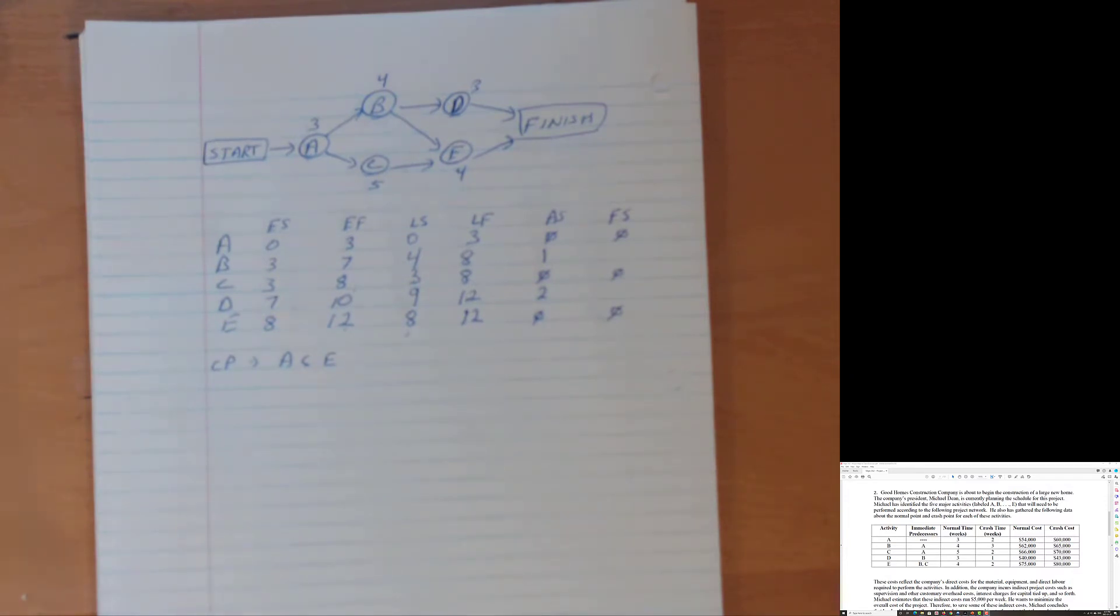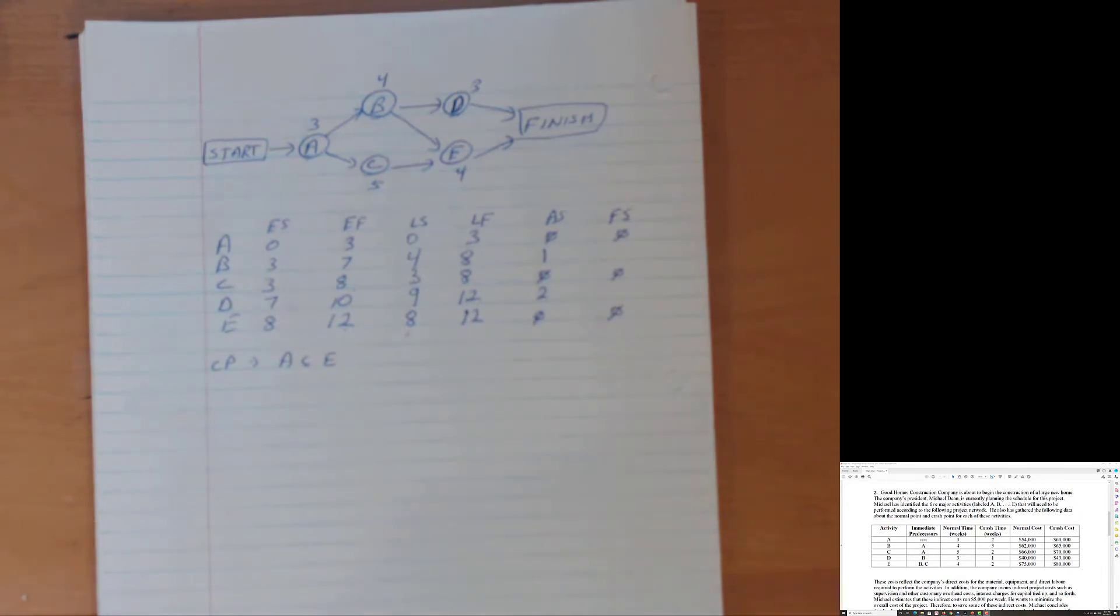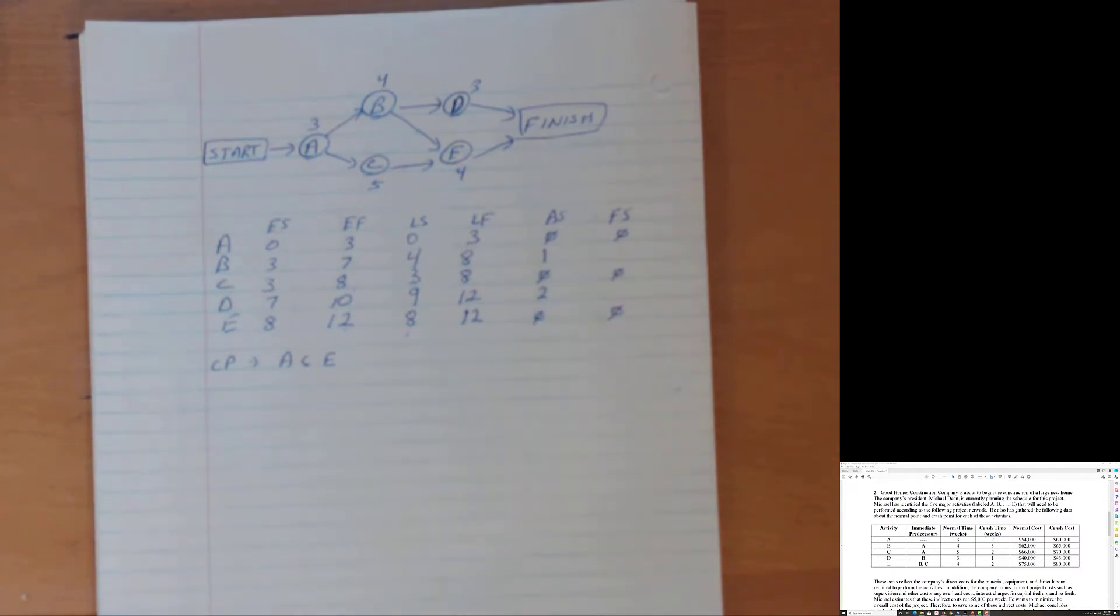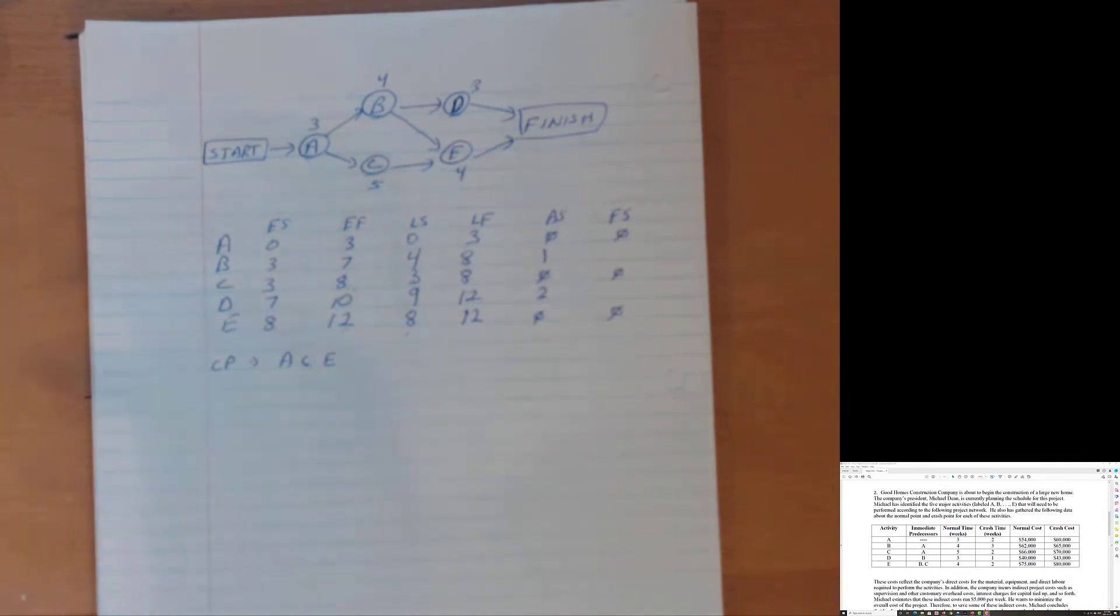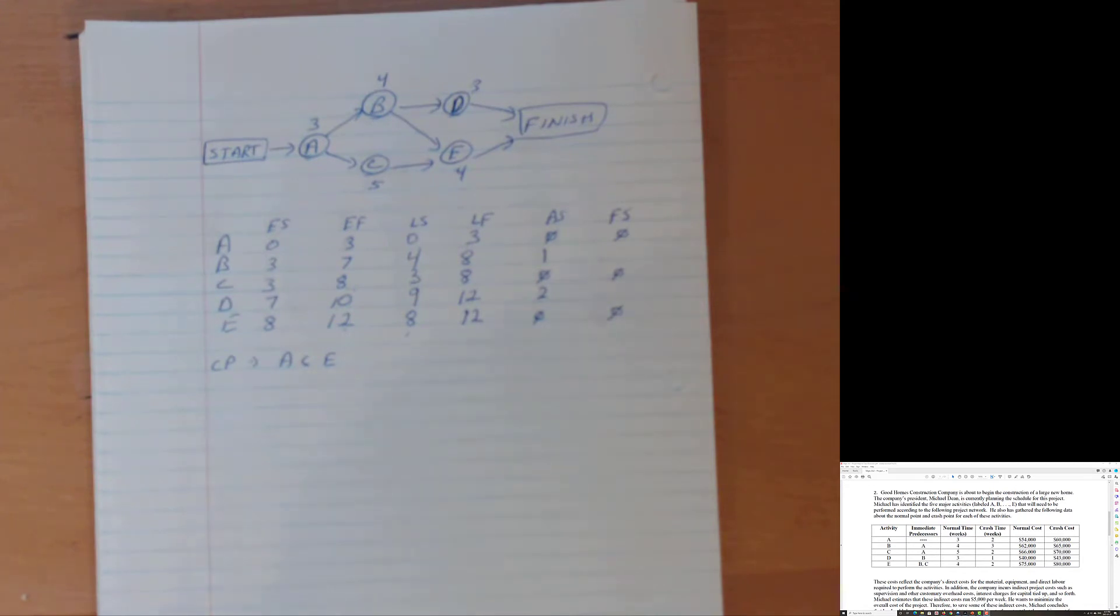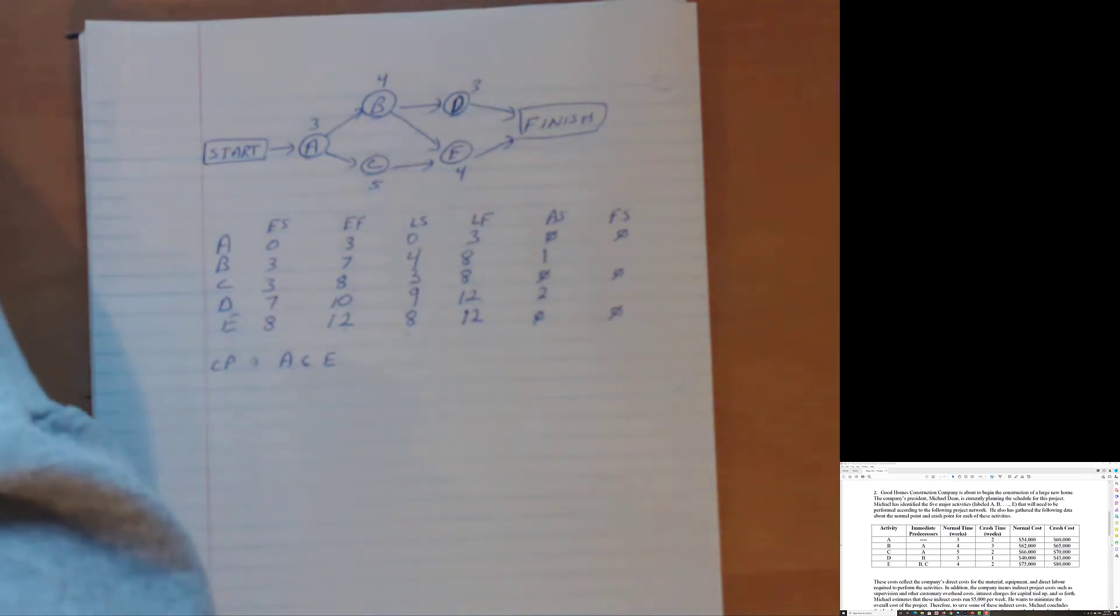So D can be delayed up to two weeks before any delays to the overall project. B can be delayed up to one week without delaying the entire project. However, A, C, E, which are on the critical path, any delays on any of those three activities messes up the whole project, delays it. Every week of delay, another $5,000 in indirect costs. How much do those project managers make anyway?